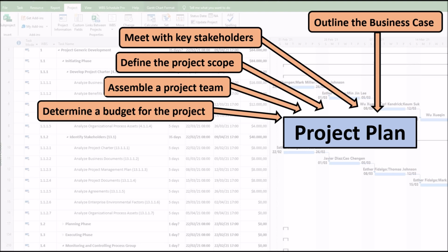Once you define the scope of your project, you will have a list of tasks that must be completed to successfully deliver your project. Carrying out all the planned tasks will require resources such as equipment, materials, human capital. And it will also require money. Therefore, the first step in creating a project budget is to estimate all likely costs associated with each task. Once you have these estimated costs, you can establish a cost baseline, which is the basis for your project budget.